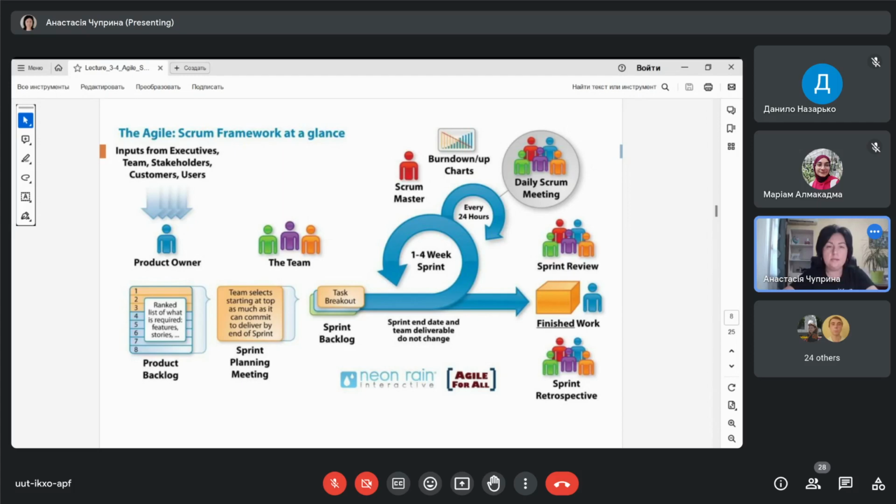Okay, next, today we have sprint planning meeting. It's an independent day to hold this meeting where all the team sits together and fills in the sprint backlog document. Today we finish the sprint backlog. Tomorrow we start our sprint. So sprint planning meeting is outside of the sprint. It's one day before the sprint. Okay, so we start our sprint. We work two weeks, each day.